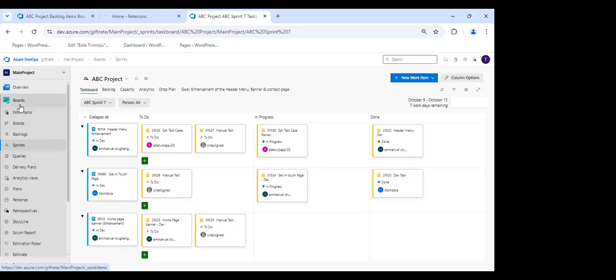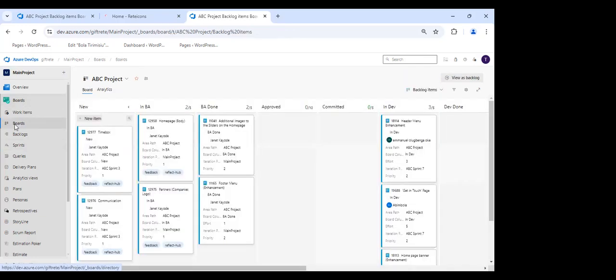Thank you so much. This one will be a very fast one. Now, you have seen how they did the stand-up, right? This happens between day 2 to day 9 of that 2-week sprint. Remember, day 1 was when they did the sprint planning. Day minus 5 was when they did the refinement. They did the sprint planning on day 1. So between day 2 and 9, every day they'll be doing this stand-up. Remember, we spoke about that yesterday.